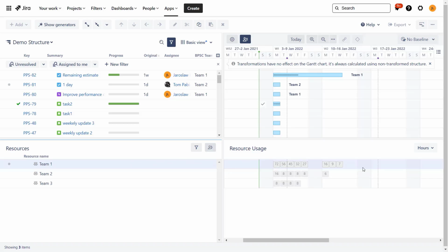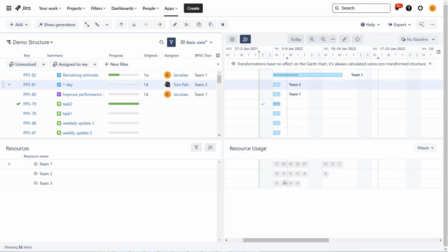And you will see that now everywhere I am in gray, because if I were to over allocate this team, I would have to assign more than 80 hours of work. So we can have the default value, but we can also have team specific numbers that will allow us to use different teams just by having a single value picked in a drop-down. All right, so we know how we can manipulate the capacity.